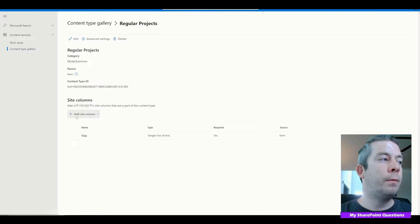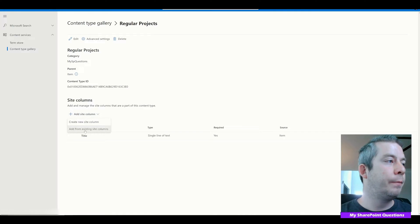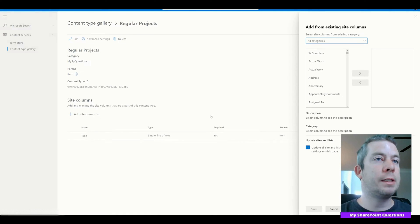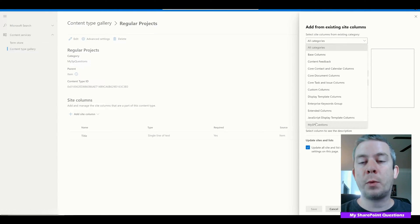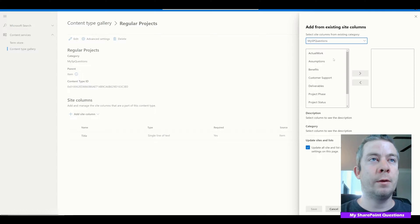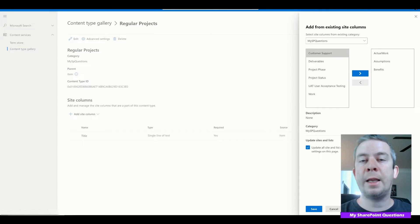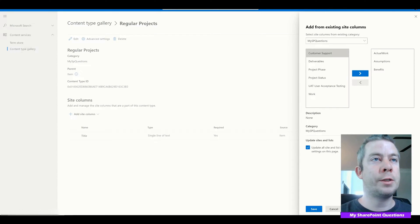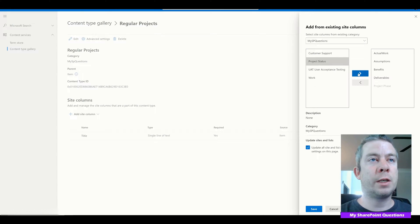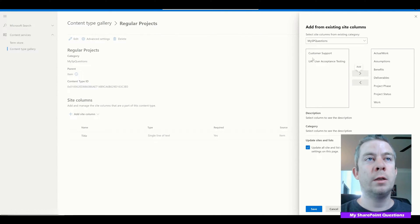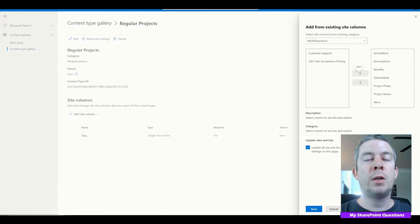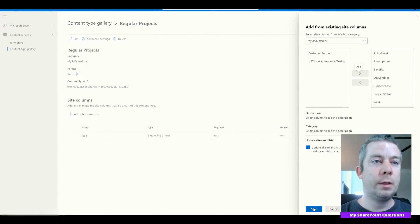Now it wants us to add site columns, so we'll go to Add From Existing Site Columns. Our category is My SharePoint Questions — this is where our organization comes in. For Regular Projects, we'll add: Actual Work, Assumptions, Benefits, Deliverables, Project Phase, Project Status, and Work. Customer Support and UAT are not included — those are for our software projects. Then we'll hit Save.